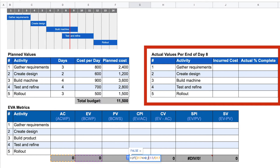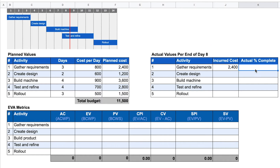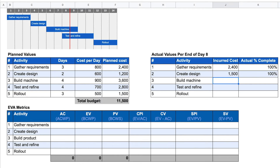For activity number one, gathering requirements, we have so far incurred a cost of $2,400, which is exactly as planned, and the activity is 100% complete. For activity number two, create design, we have incurred a cost of $1,500, which is more than we planned. But the activity is also entirely complete. For activity number three, build product, we have incurred a cost of $2,700, which is still below the plan.